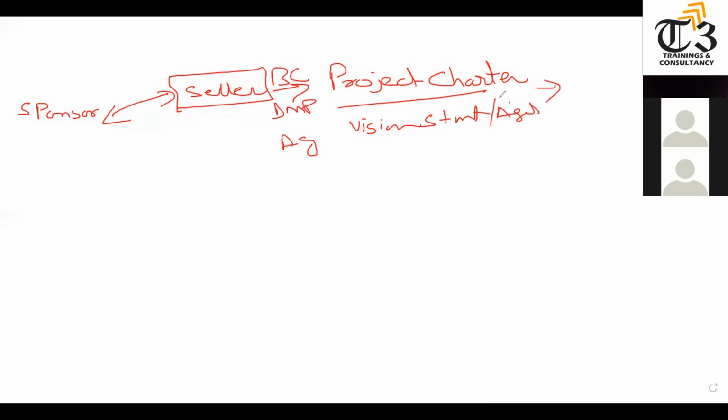What does the project charter contain? We said high-level objectives, high-level assumptions, constraints, high-level risks, major milestones, exit criteria from the project, investment requirements, approval requirements, sponsor name and authorities, project manager name with accountabilities, responsibilities and authorities, and an initial list of stakeholders. So once the project charter is defined, whether you are in predictive or Agile, your first task after becoming the project manager is to identify the stakeholders.